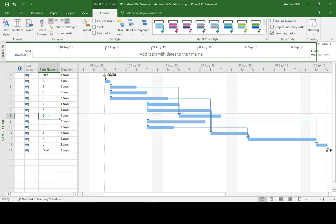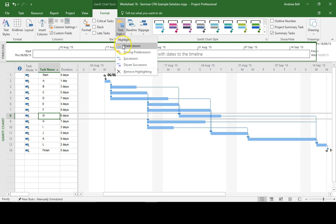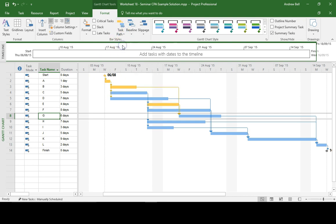I want to see the tasks that lead into Task G, the predecessors to Task G. So I can go Task Path predecessors, and that's highlighting tasks A, B, and E as predecessors.